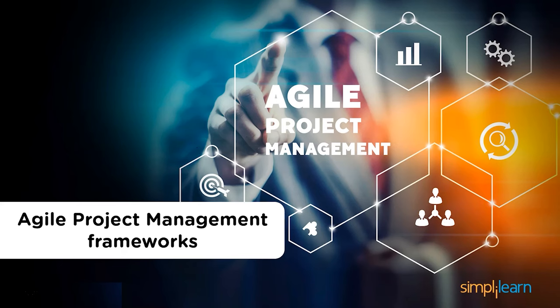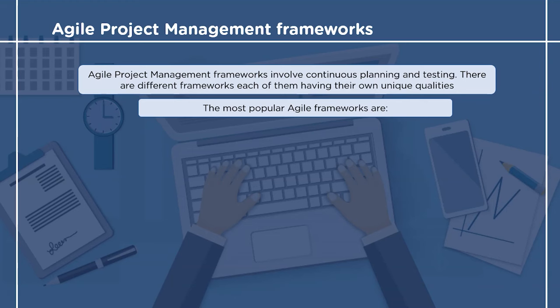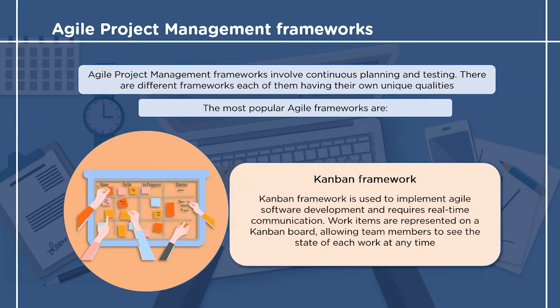Now that we know the steps needed for agile project methodology, we must understand some agile project management frameworks. There are several frameworks available today; here we will discuss some of the most popular ones. The first framework is the Kanban framework, a well-known framework for implementing agile software development. In Kanban, work items are represented on the Kanban board which helps all team members see the state of every piece of work at any time.